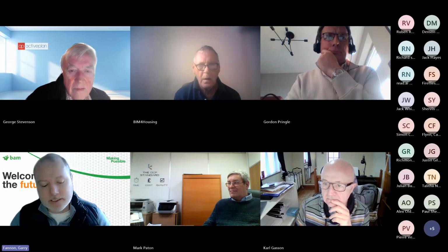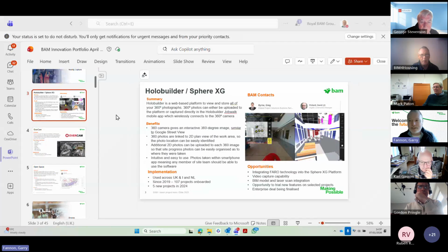So Hollow Builder is a product we are wholesale deploying on all construction projects. We made that decision last year, and it wasn't anything to do with our clients. It was to do with protecting our business, protecting ourselves from claims. So when we hand buildings over, 11 years later, we get a claim from a client who suggested that we didn't put the fire protection in properly. And we have paid out because we didn't have the evidence to prove the contrary.